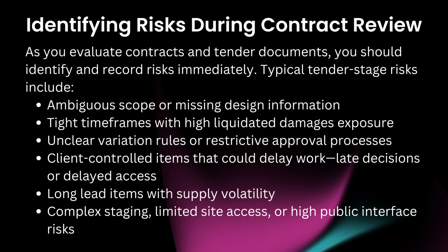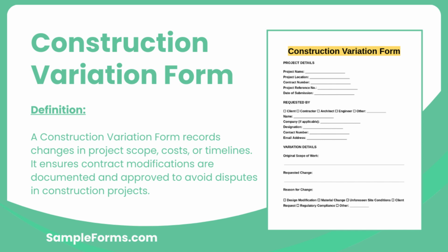Identifying risks during contract review. As you evaluate contracts and tender documents, you should identify and record risks immediately. Typical tender stage risks include ambiguous scope or missing design information, tight time frames with high liquidated damages exposure, unclear